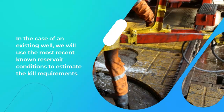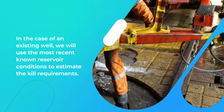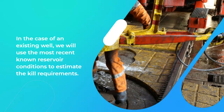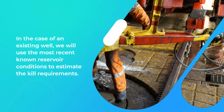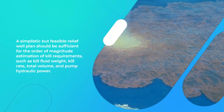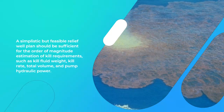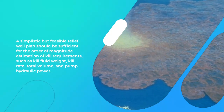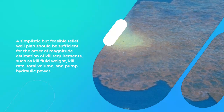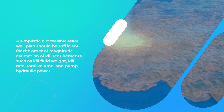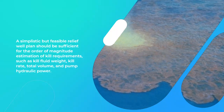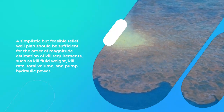In the case of an existing well, we will use the most recent known reservoir conditions to estimate the kill requirements. A simplistic but feasible relief well plan should be sufficient for the order of magnitude estimation of kill requirements, such as kill fluid weight, kill rate, total volume, and pump hydraulic power.